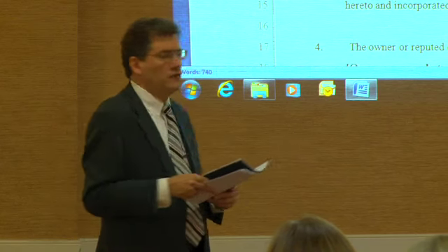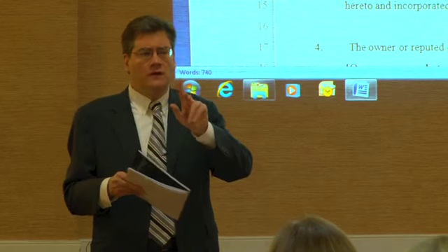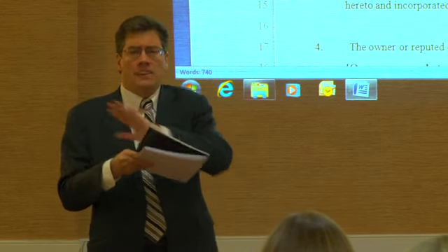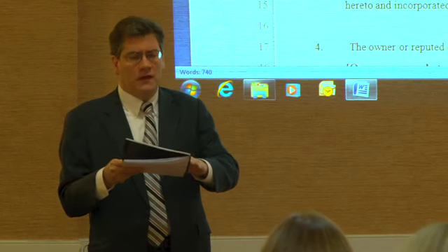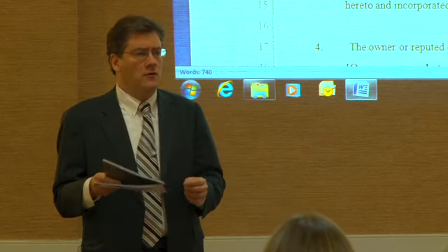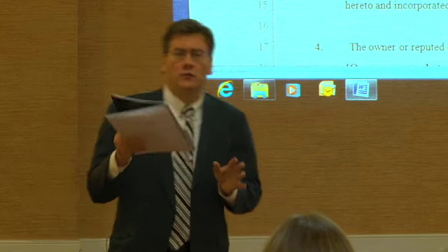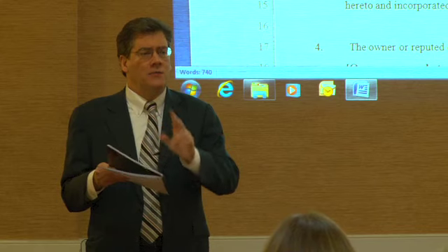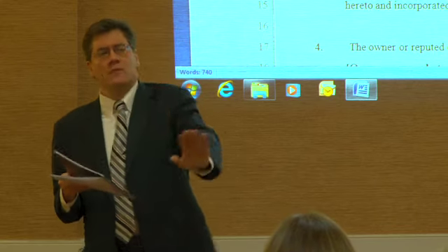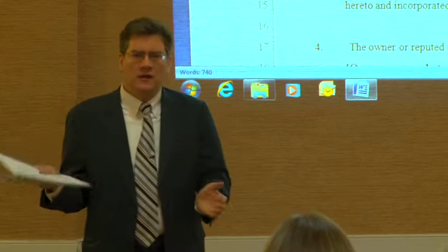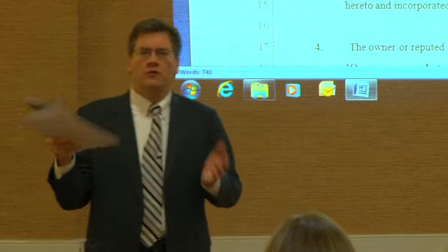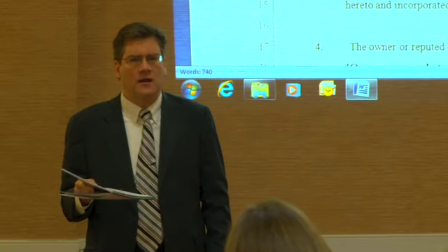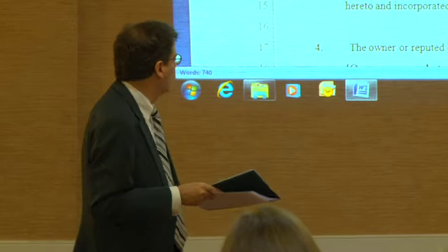Now, if you're going to keystroke things in, then you got to have 2 sets of eyes looking at it. Somebody's got to be looking at the legal description online or in the print off of a deed while the other person reads it aloud. I'm a big fan of that. If you're doing this internally, you got to be staffed up and have a pattern and practice of people pairing off before it goes in the mail. Do we cheat on occasion? Yes. When it's super duper easy and it's clear as a bell, but you got to really make yourself focus and get it right. And it's not the way you should live all the time.